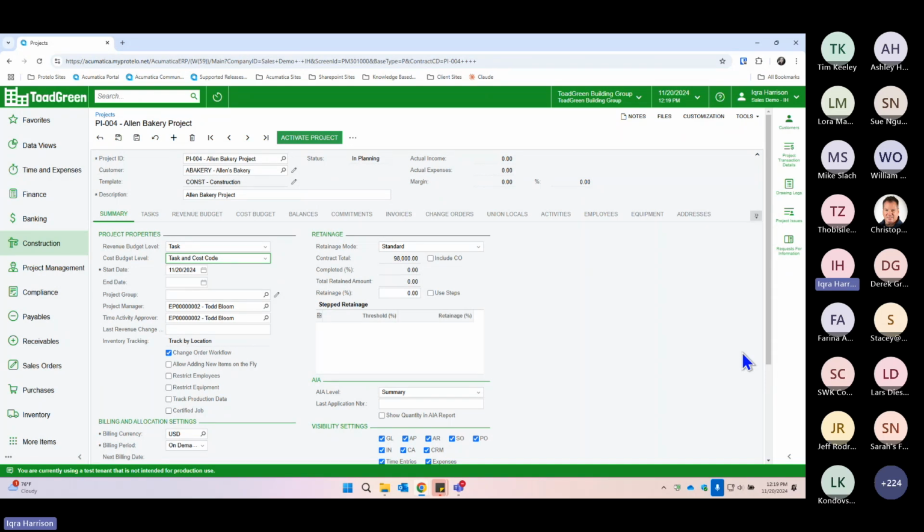We are also going to track quantities and unit cost here. Including all these aspects can help us understand the breakdown of the costs in detail, whether it's labor hours, material quantities, or just subcontractor charges. It gives us better control and visibility into where the project's money is going. Now let's go ahead and set up the cost budget.